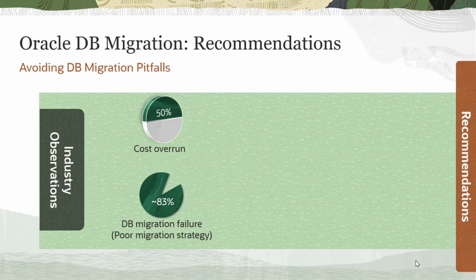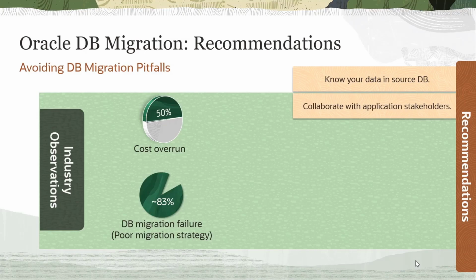Let's discuss briefly some of the elements that you can take into account while planning your migration. Understand the data you want to migrate, their dependencies, compatibility with the target database system, whether you should migrate a portion or in entirety, its size and all such attributes. Internally, you should collaborate with all data owners, explaining the migration plans, the benefits it can bring, the project timelines, the downtime, and operational changes post-migration, so that there is a consensus among the stakeholders and there is no pullback once agreed.